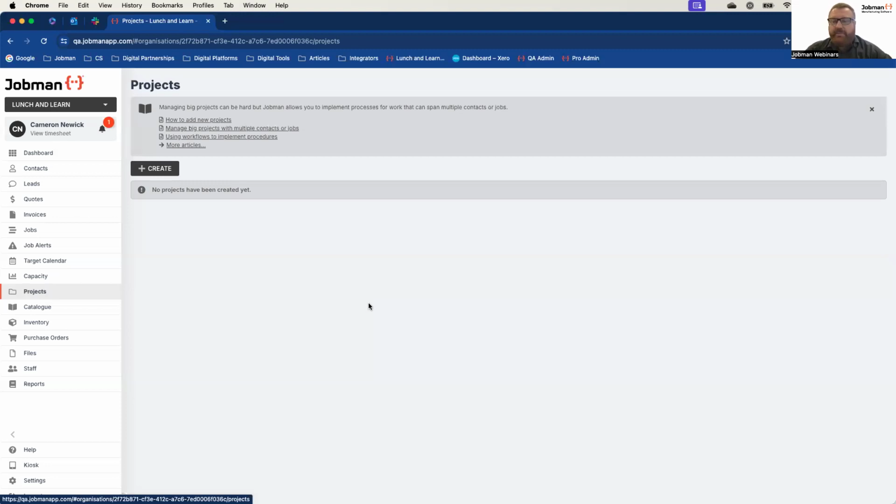A great example might be the recent fit out at the hospital in Murdoch. There were a couple of major joinery companies that got involved in that project, and each of them was designated areas. Now, each of those areas would be a job. So the front foyer fit out, the cafeteria, the play area, a lot of the internal works. Each of them in itself is a job. It has its own resources. It needs to be measured. You want to track those operations.